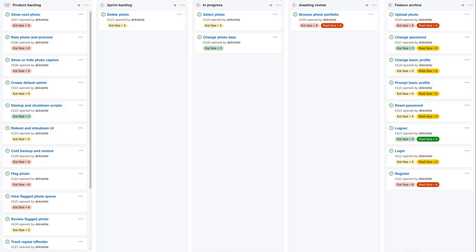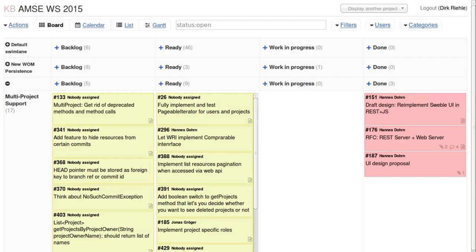As you know, we use GitHub projects for that. So that's just a Kanban board. And you can see how a feature moves through the different stages here of being put into the sprint backlog during sprint planning, then being picked to be worked upon. So it makes it into the in progress column. And when it's done, the feature ends up in a waiting review. And after a review and release meeting, it will be moved into the feature archive. Here, we do not see any tasks. These are still full-blown features. But we could take each feature and as we work on it during in progress, break it down into individual tasks.